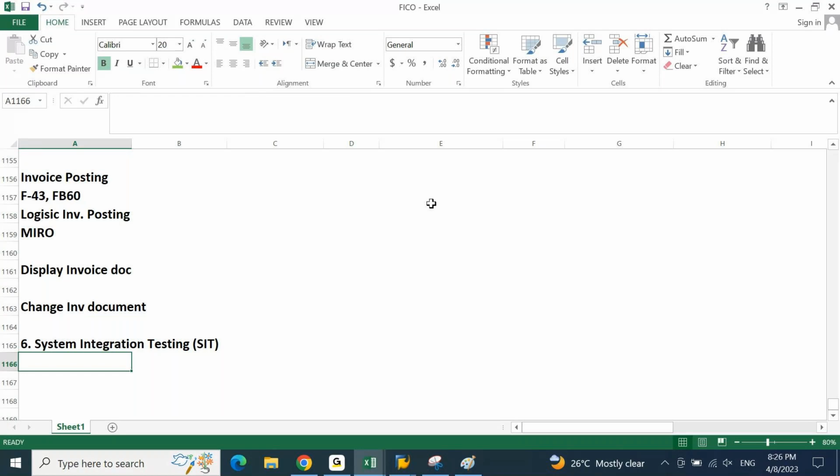Different users will be sitting there, and all the points you are discussing will be captured. You will also have one sheet called an attendance sheet. You will prepare one attendance sheet of all the users present at that UAT. You'll have to take the signature of all the users who were present at the UAT testing, and this attendance sheet will be documented. Okay, sir. Thank you, sir.